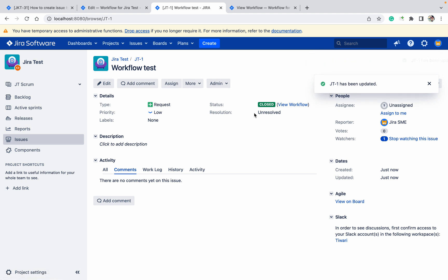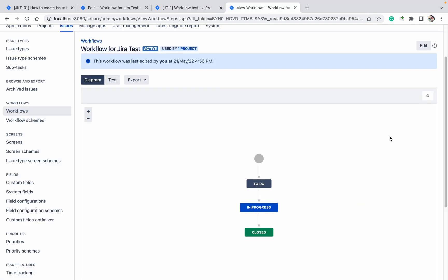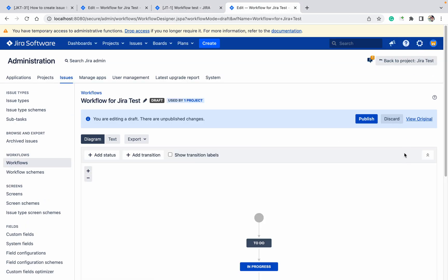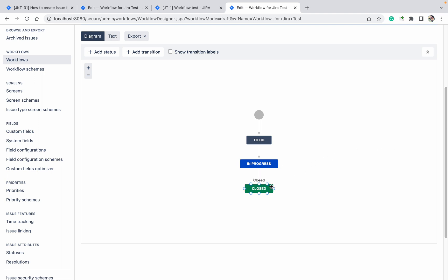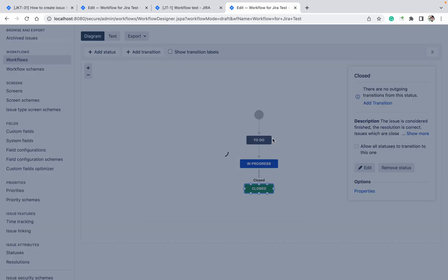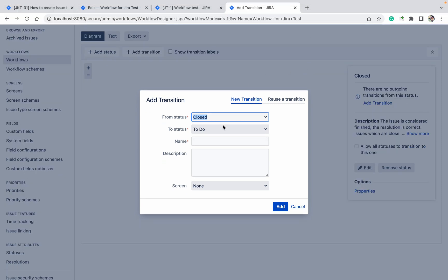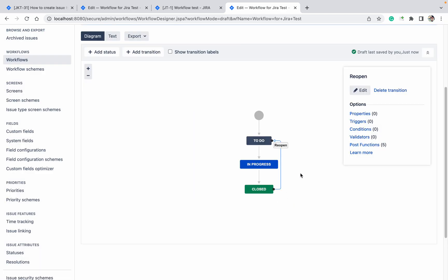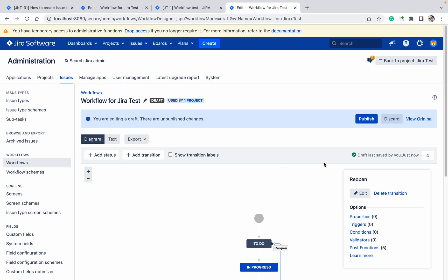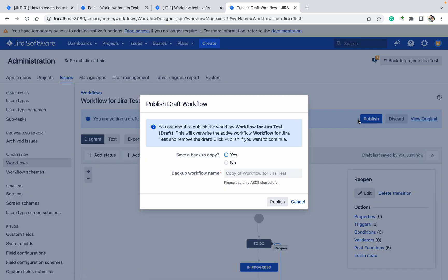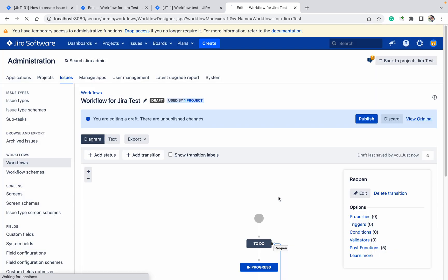If you want to reopen a ticket, you cannot because there is no transition available. To add the transition, click Edit, then draw the transition from Closed back to To Do and name it 'Reopen', then click Add. Note that this is in draft and will not work until you publish it. Click Publish — no need for a backup copy.